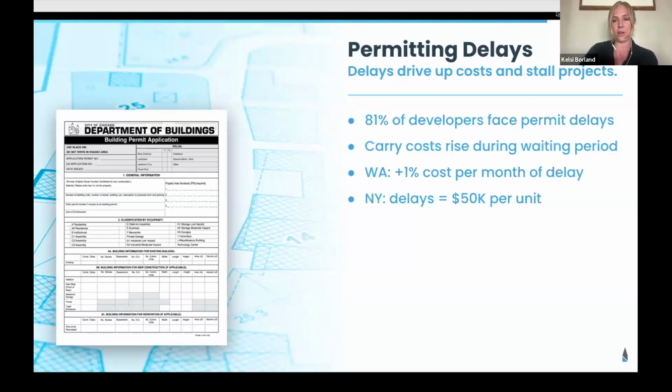It definitely varies, though, depending on your location, the location of your development. But 81% of developers report permitting delays on their project, and it honestly can significantly increase the cost of a project, right?